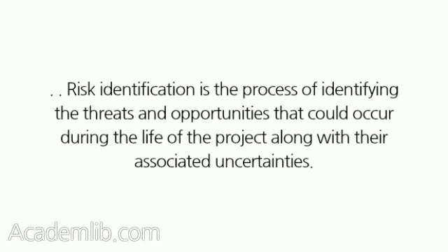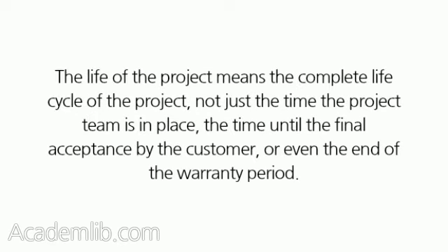Risk identification is the process of identifying the threats and opportunities that could occur during the life of the project along with their associated uncertainties. The life of the project means the complete life cycle of the project, not just the time the project team is in place, the time until the final acceptance by the customer, or even the end of the warranty period.